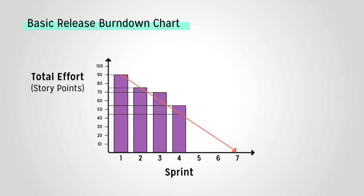At the beginning of sprint 4, we should have completed 45 story points altogether and be halfway through development. But our bar for sprint 4 is above the prediction line — we are behind by 10 story points. Let's say that at the beginning of sprint 4 we hired two more developers because we saw the project was behind schedule. In sprint 4 we completed 25 story points, putting the project back on schedule. In sprint 5 we completed 25 story points again, putting us ahead of schedule — our bar for the beginning of sprint 6 is now below the prediction line.